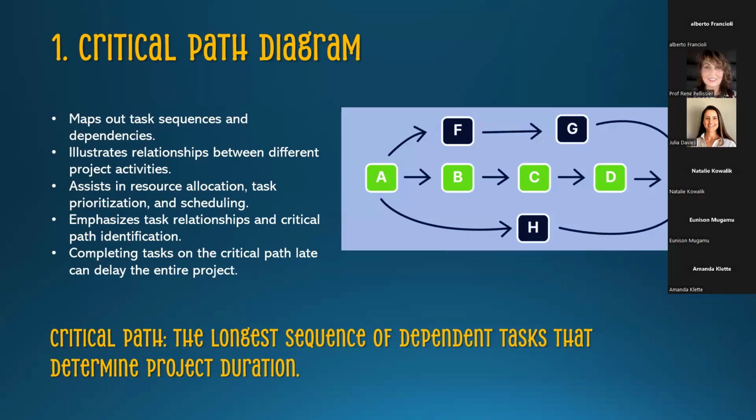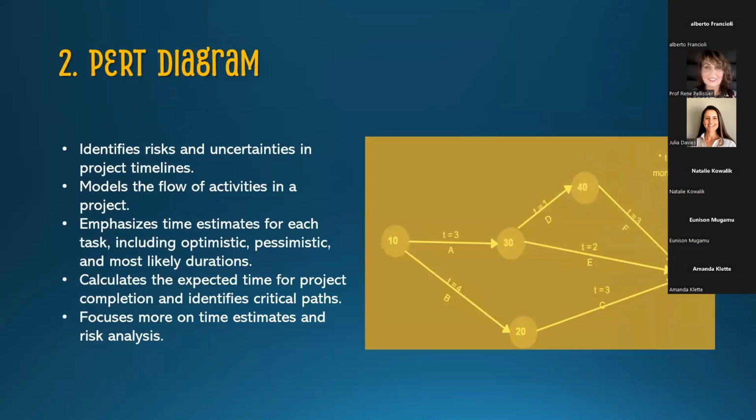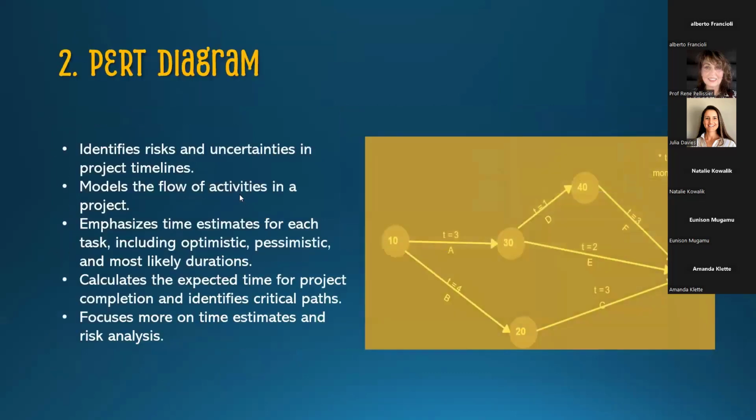So I can add to that, we just did the critical path. Here's a PERT diagram. The PERT diagram is the same as the CPM. Remember, the PERT diagram handles more complex research projects. The CPM is a very simple, linear way of looking at the shortest path to finishing the project. The PERT diagram has the advantage that it can also include uncertainties, but because it goes for complex problems, you'll see the drawing becomes far more complex.